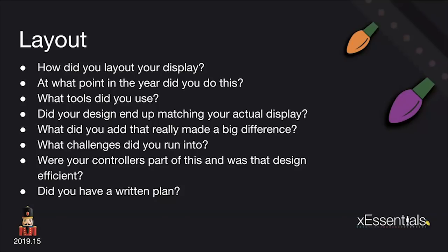I always add 20% to my pixel orders because Lord knows how many times you have a bad pixel, or you need to add a prop at the last minute, which always happens when Square comes out with something new late in the year.